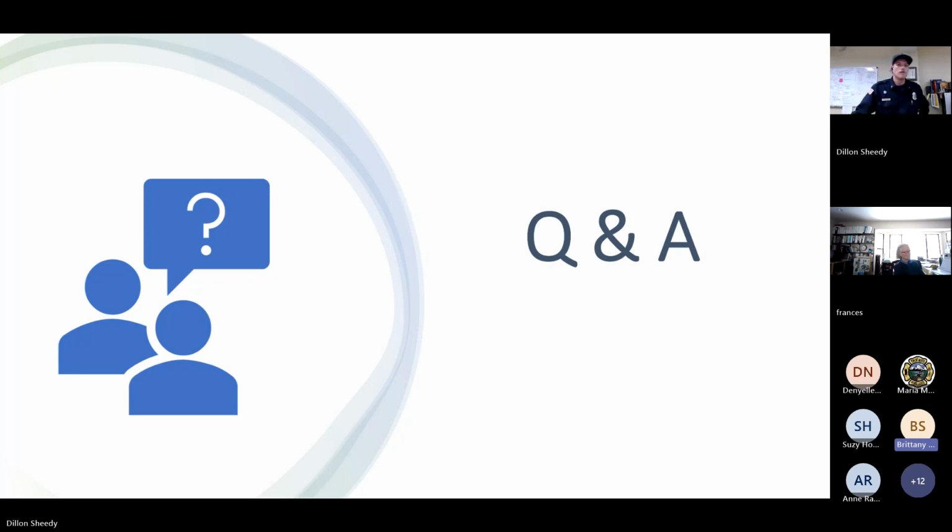Next question from David Galson. Is the application preparation time allowed as in-kind match on a project application? No. So only costs within the performance period of a grant are eligible to be counted as match. So that is when a grant is executed, usually on July 1st through when the grant expires on June 30th. So no, you cannot claim time for preparing an application as match.